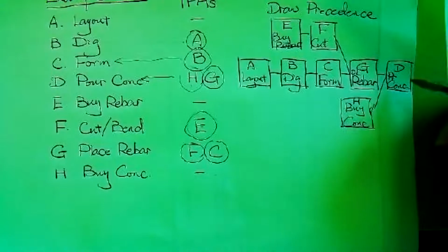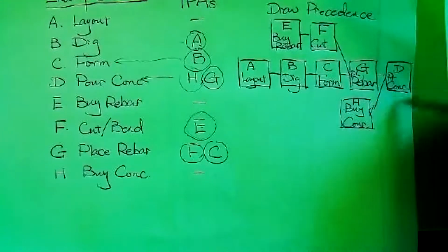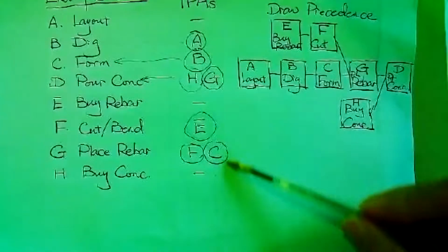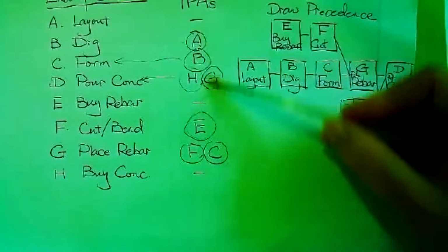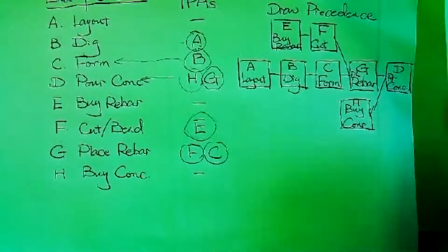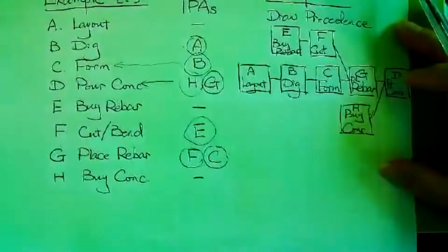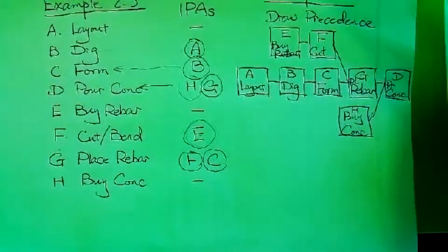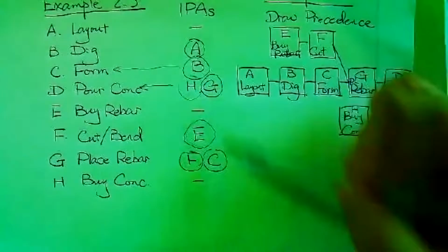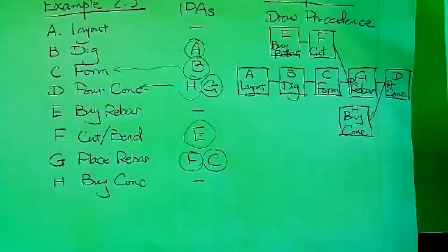So another way to find if this is done, you can check the last one, D. Last activity in our diagram is D. You find from the table, there's no D at all. Then this is the end. Okay, any questions about this? Just trace the table, and if there's two of them, trace back.